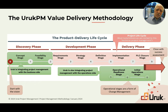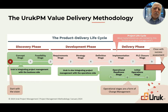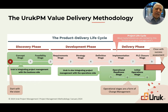We also need to consider the development approach for the product. Will we use agile development — iterative, incremental, or both? Or traditional sequential, what some call 'Big Bang'? Or a blended approach that some call hybrid? It depends on the nature of the project. As an example, when developing the Rook proof of concept, the first few months were Big Bang — no access until the team delivered something testable. Since then, we've been doing iterative incremental development.